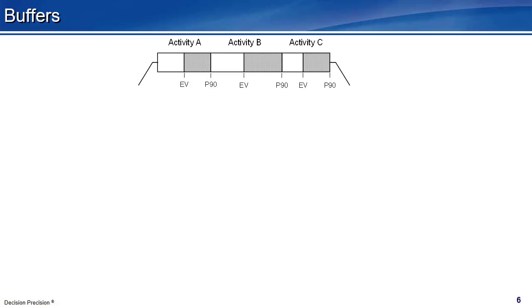This figure illustrates Goldratt's presumption that most single-point activity time estimates are conservative. The path is a sequence of activities in parallel with other activities or paths. In typical estimation, people conservatively judge time to complete for each activity, say at a 90% confidence level. An objective, meaning unbiased, activity time estimate would be an expected value or the mean statistic. The shaded P90 minus expected value difference is padding or safety.